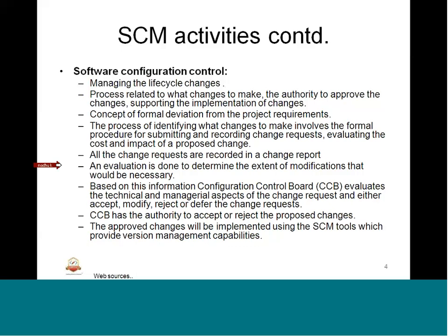The process of identifying what changes to make uses the formal procedure for submitting and recording change requests and evaluating them. Evaluation also in terms of cost, schedule, what changes the proposed change is going to make. And we may identify some resources, we may identify tools to make the change, what procedure we are going to follow, any customer involvement that is required, all will be decided. This decision will be taken care of by the CCB, that is configuration control board.